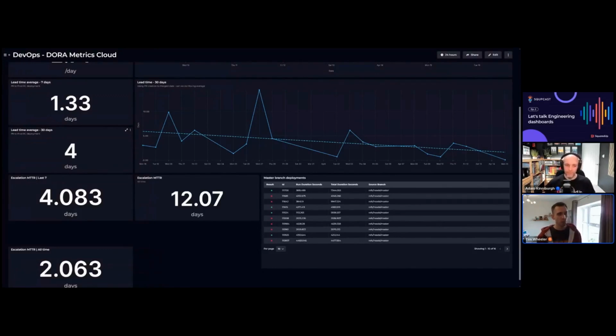For us, what we look at is when we go from the PR, essentially when the developer's saying, I'm finished, here's my feature, to when it is live in our production system. That's what's giving us the graph, with a lovely trend line which is going down, which is obviously good news, because the lead time going down means we're getting things into production faster.